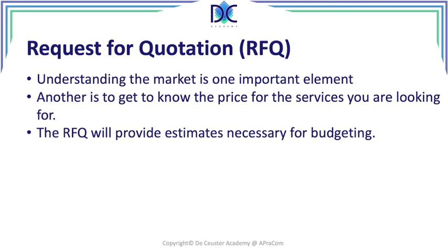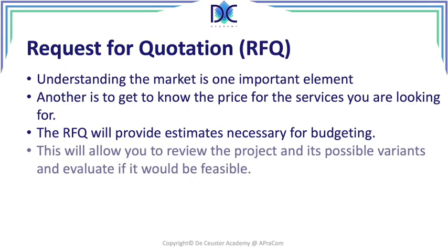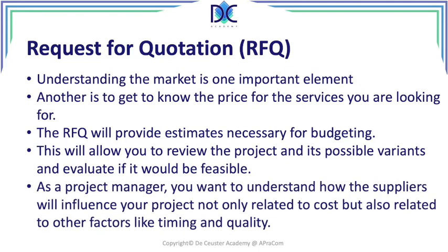So the RFQ will provide you estimates necessary for budgeting, and basically it will allow you to review the project and possible variants and evaluate if the project will be feasible. As a project manager, you want to understand how the suppliers will influence your project, not only related to cost, but also related to other factors like timing and quality.